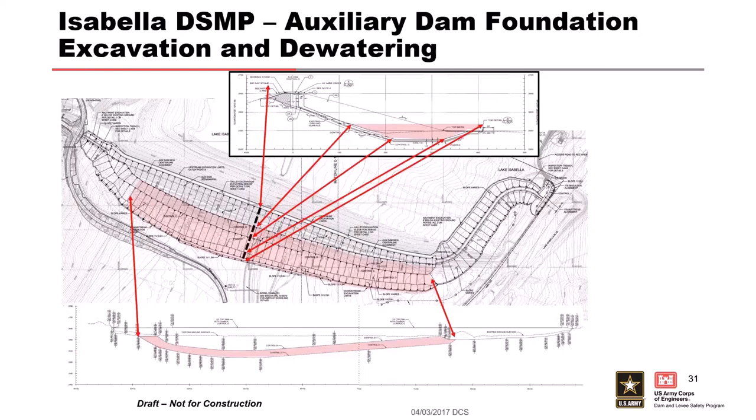One key design consideration was that we were excavating at the toe of an active DSAC-1 project with many internal erosion failure modes that had to remain operational during construction. We spent considerable effort during design developing a government-level dewatering design for the required excavation. This was ultimately a contractor-designed dewatering system, but with specified targets based on our understanding, since we had to keep this project fully functional up to a restricted pool during construction.